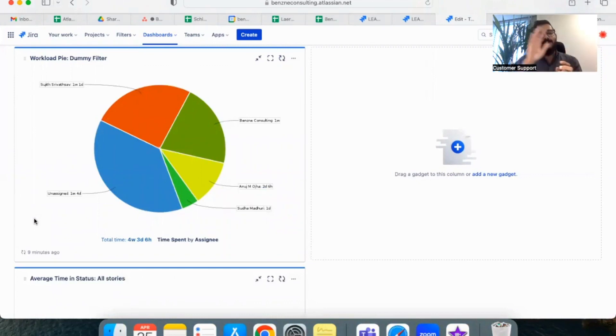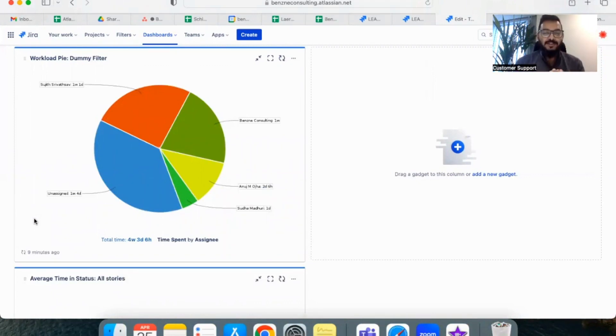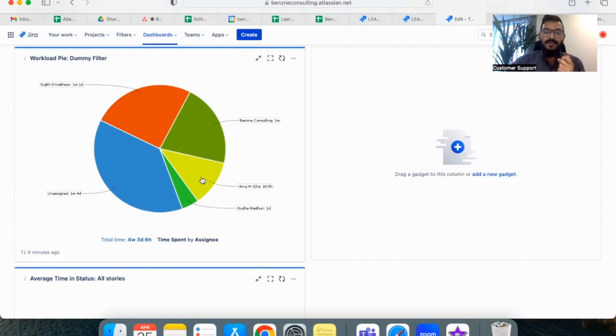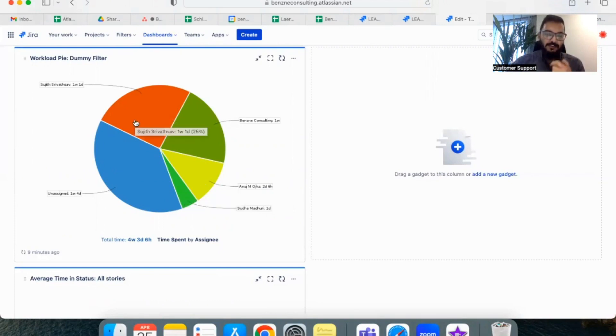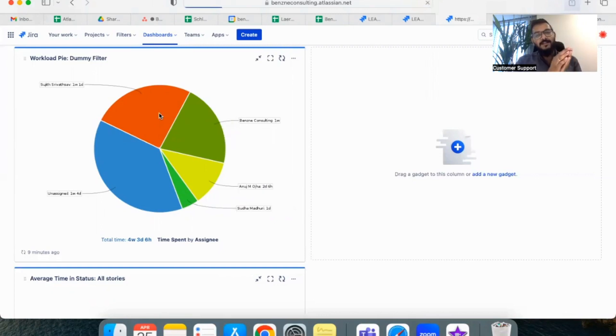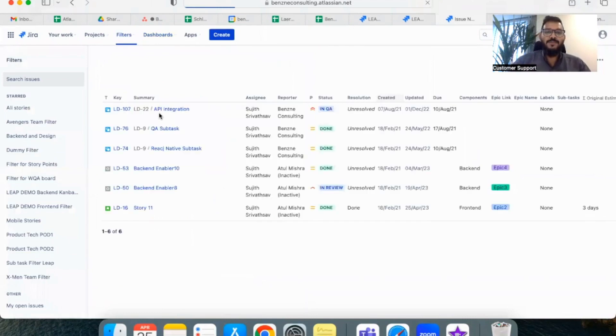This should give you a pie chart of assignee versus time spent in the last two weeks based on the filter you have created. If you closely observe this graph, it talks about who are assigned in our team for the sprint and how much time they have spent in the last two weeks. If you click on the graph, you will be directed to a list page where you can see which person has worked on which ticket also.